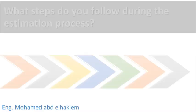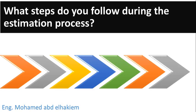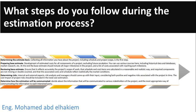What steps do you follow during the estimation process? First, determining the estimate basis: collecting all information you have about the project, including schedule and project scope. Second, preparing the base estimate: developing estimated costs for all components of a project, excluding future escalation, using sources such as historical data, databases, and market research. The base estimate should include all major milestones in the project and a list of costs associated with reaching each milestone.